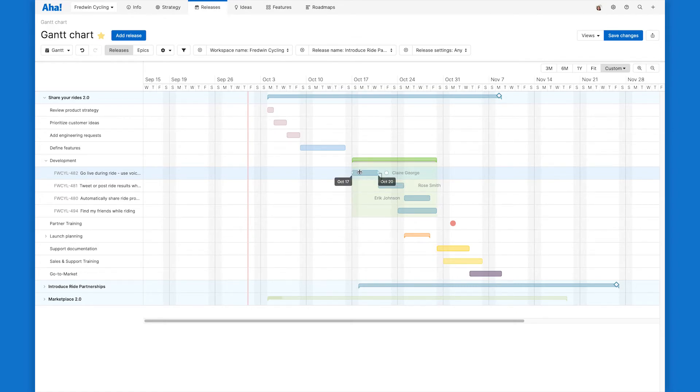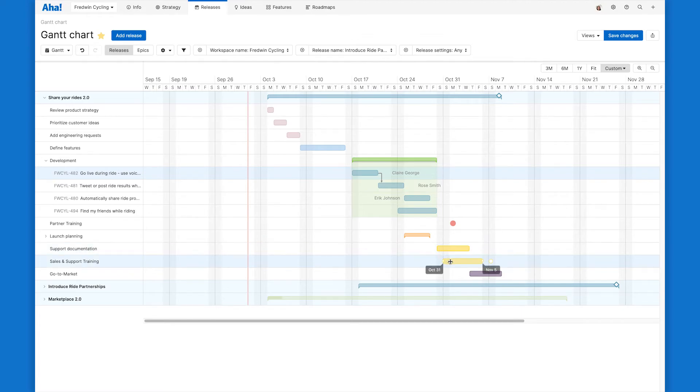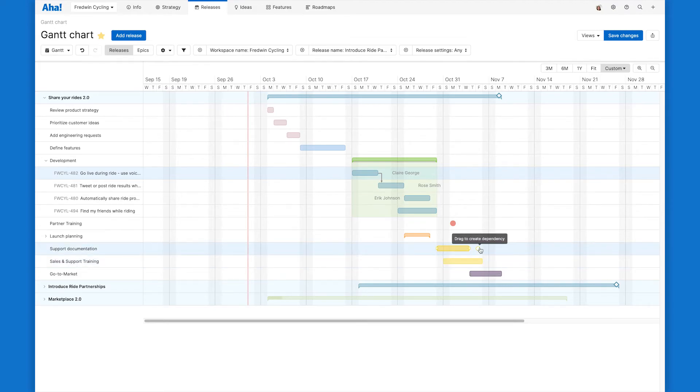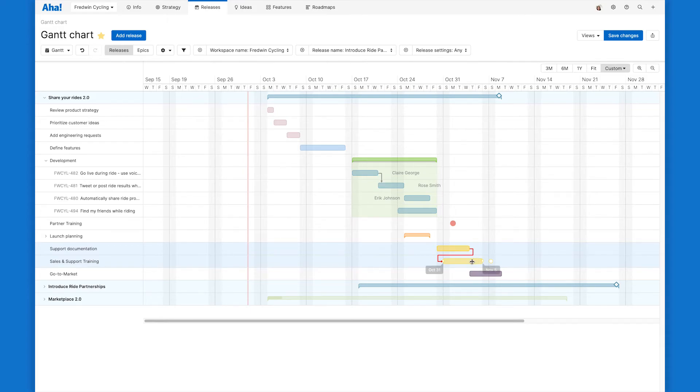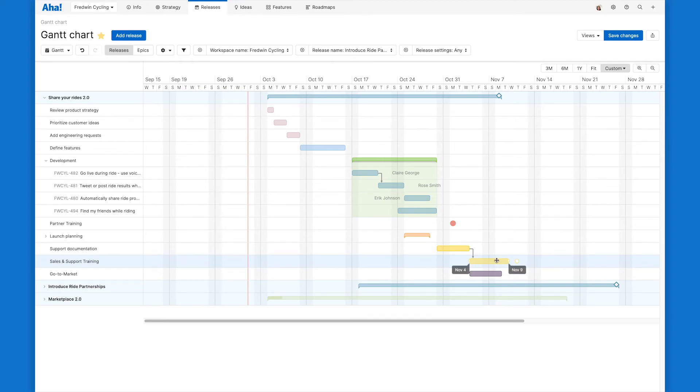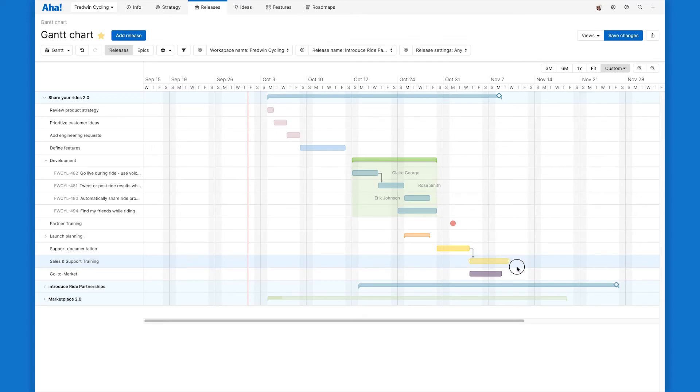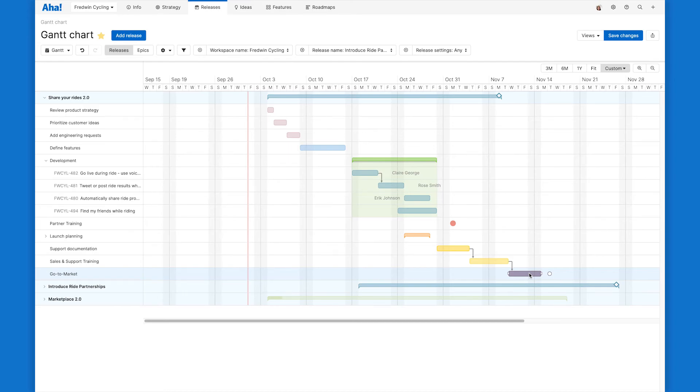Okay, we have another dependency I want to show here as well between our support docs and our training. We need our support documentation to be complete before we can start training our team. So I'm going to create that dependency line here and right away I can see that there's a problem. So I need to make some adjustments here to my plan. I'll pull this phase forward on the timeline and I'm seeing another issue here as well. We can't go to market until our teams have been fully trained. So I'm going to show that dependency and now I see that I have to push this phase of the release out as well.